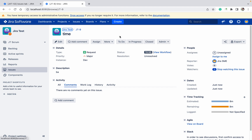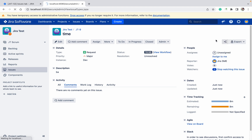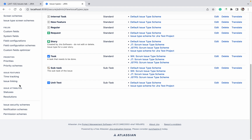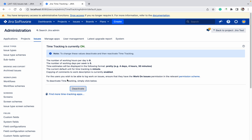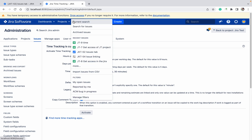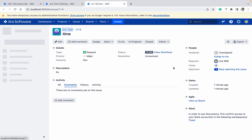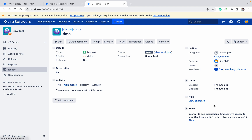Time tracking is the field we already saw. To make changes, go to Issues, then Time Tracking under Issue Features. You can see it is currently enabled. If you want to deactivate it, click on Deactivate. Time tracking will be off. If you come back to Issues and Time Tracking, you will not be able to view it. Like this, you can enable or disable it.